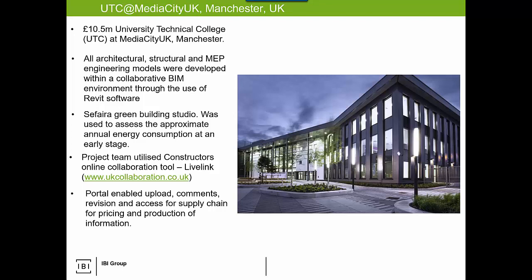BIM coordinators often get sucked into the realm of, in a Revit project, linking Revit models, building content, sharing the models across the team, managing that collaboration system. Well, great, what happens when we're done? Where's all the data going? Who's tracking the design decisions? In a design build project, who's tracking the review and approvals and the actual transmission of submittals to the trades as things are being built on site?